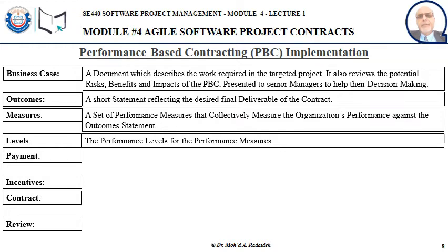If they come up with, let's say, 40% of what we ask for, we may say in the contract that we won't pay anything, we won't accept that work, or if they want to give us that work, we will take it for free, and so on. So classifying the level of performance into sub-levels helps us decide what to do with the various possibilities when it comes to performance.